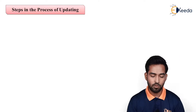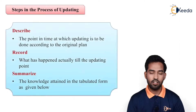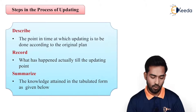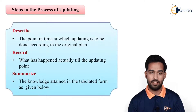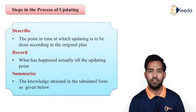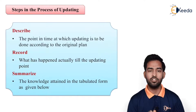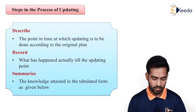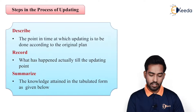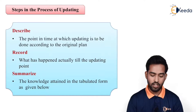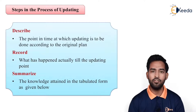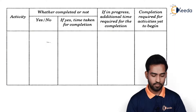Now, the actual steps in the process of updating. First is 'describe': identify the point in time at which updating is to be done according to the original plan. Then 'record': what has happened actually till the updating point — all this record we have to maintain. Then 'summarize': the knowledge is entered in tabulated form using a specific table. We have to fill all the necessary data in this form, such as the activities going on, whether they are completed or not.